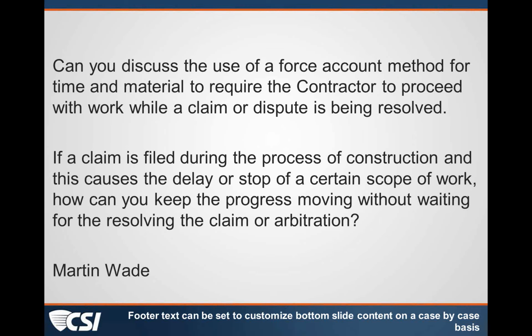So if you do get into a dispute and you are entering into mediation and arbitration during the course of the work, and it causes a valid delay to the contractor, then he is, according to the documents, entitled to an extension of time. And the last section I wanted to point out in the AIA 201 General Conditions is Section 15.1.2 that says, pending final resolution of a claim, the contractor shall proceed diligently with performance of the contract.